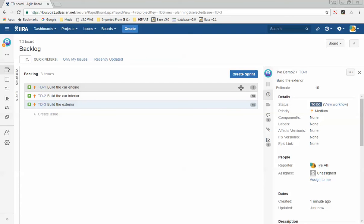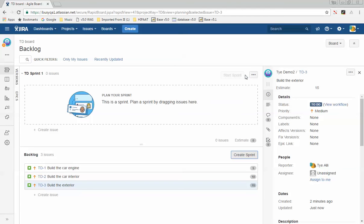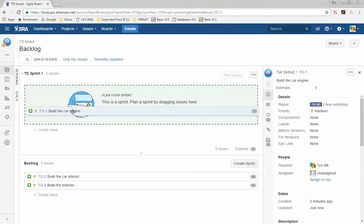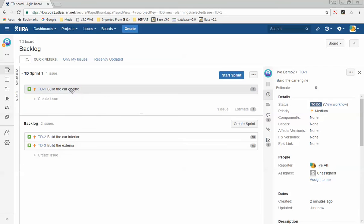This is how your backlog will look at the end of the planning meeting. The next step is to create a sprint — we'll call it TD Sprint 1. Now we move work from the backlog into the sprint by dragging and dropping. I'll drag and drop my stories into the sprint.